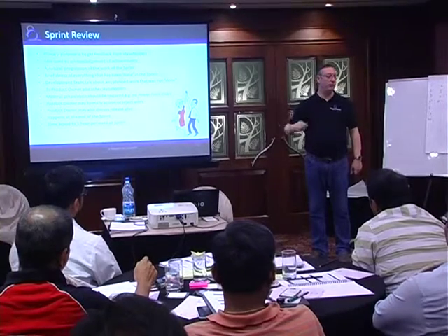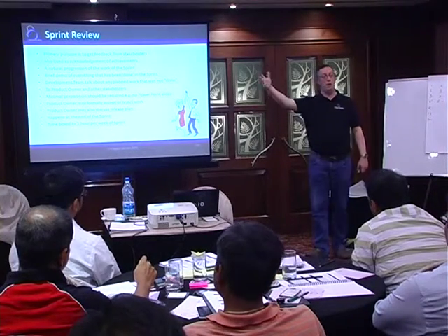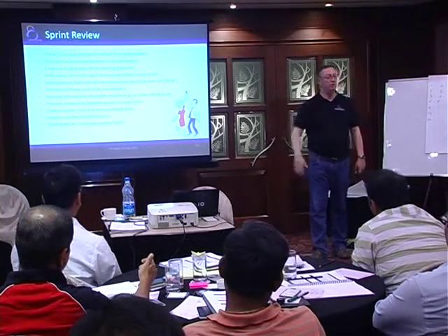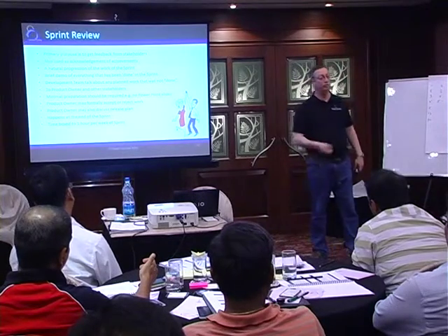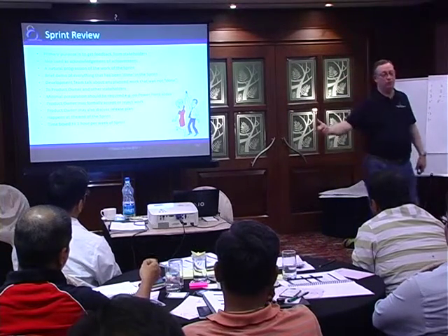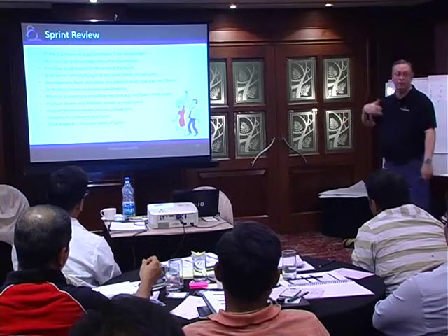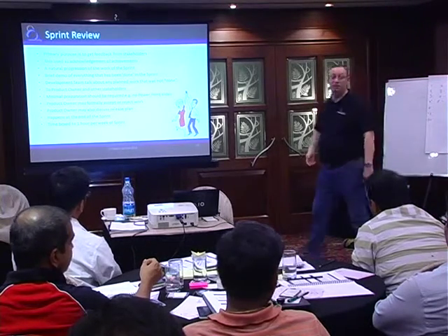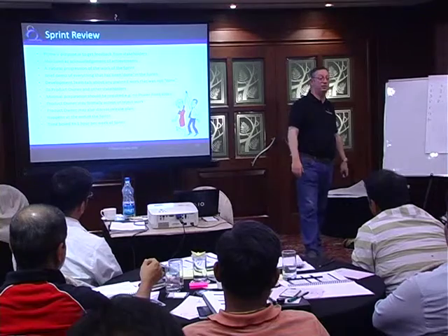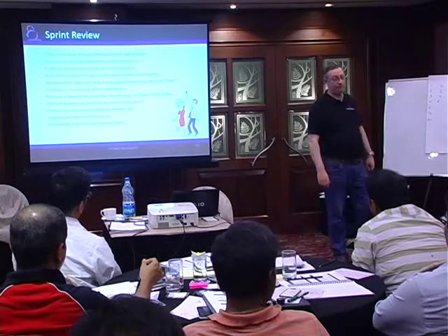This is how the team velocity changed. This is what we're now predicting for the release. It's all about getting feedback about the product. Could we release sooner? Do we need to spend longer before we release? It happens on the last day of the sprint. It's on the last day, and this is the penultimate activity of the sprint. You do this and go back.